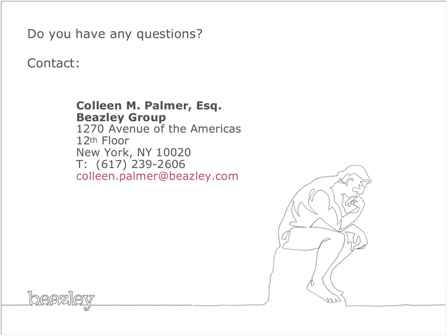So this happens when the borrower, probably, we're talking to engineers, so typically architects get these assignment documents and then they'll flow down maybe to the engineers, but usually it's if the client who borrows or wants to borrow money from the bank defaults, or they do these things before there's a default just to get it all teed up, that if they default, the bank will be able to have those contracts that the borrower has be assigned to the bank.